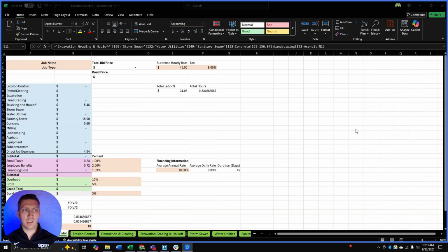This is a civil contractor, so they use Excel. There's some other tools that you can use, but it doesn't really matter. All that really matters is that it ends up in Excel, because you're going to have a list of all the materials, and align every material and every hour and every single thing that you estimate into a budgeted line item. So I'm going to walk you through just our typical bid sheet and how we do it and what it should look like by the end of it.